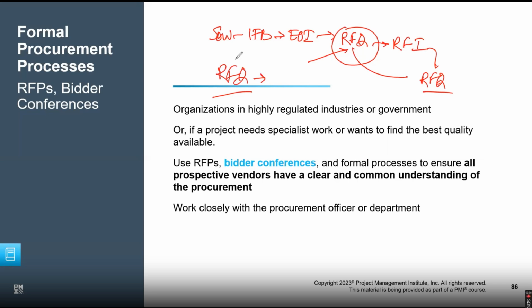Have you seen that? Actually, yes. In our industry, we are collocating the RFP and RFQ together. Based on the RFP stage, they will submit their RFQ as well. Again, the ground level reality could be very different, but RFQ is meant only for quotation, which is the amount only. How we practice it will vary from company to company.